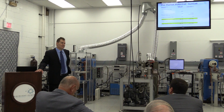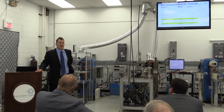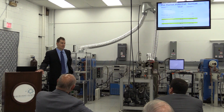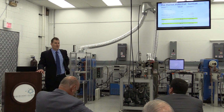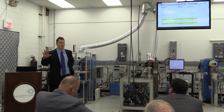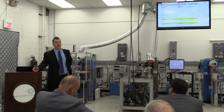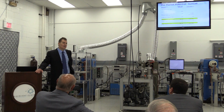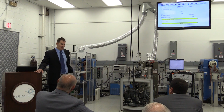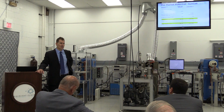I would say the mechanical part, we should be on schedule for that for sure, but it's just a question of how long it takes for the PV side to be put together. Get our light source, hook the PV, have the right output of the PV for the ignition system primarily. And so we're working with them now, but it's just a question when they can deliver their part and then get the optical system built. So we really don't have any information on the timing of that. I know if you go to the entirely new array, they're saying they like 6 months. They build entirely new cells and new dense array. But we can use what they already have. They're saying 3 weeks, something like that, delivery time. So it's reasonable. So we have to see how the PV and the optical distribution system timing works out. The other mechanical system, I think we're definitely on schedule for that.